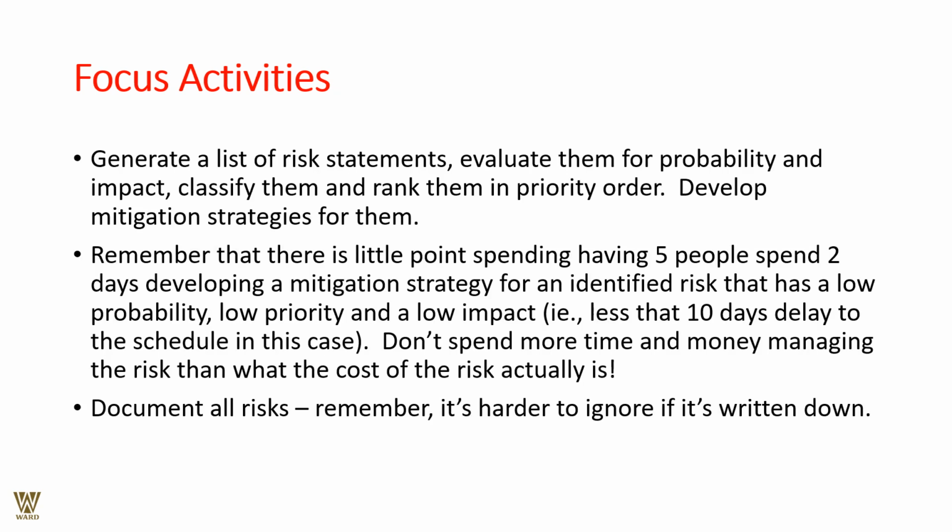The focus activities: generate a list of risk statements, evaluate them for probabilities and impact, classify them and rank them in priority order, and develop mitigation strategies for them. Remember that there is no point having 5 people spend 2 days developing mitigation strategies for identified risks that have probably low probability, low priority, and in fact maybe no impact, that is, less than 10 days delay to the schedule in these cases.